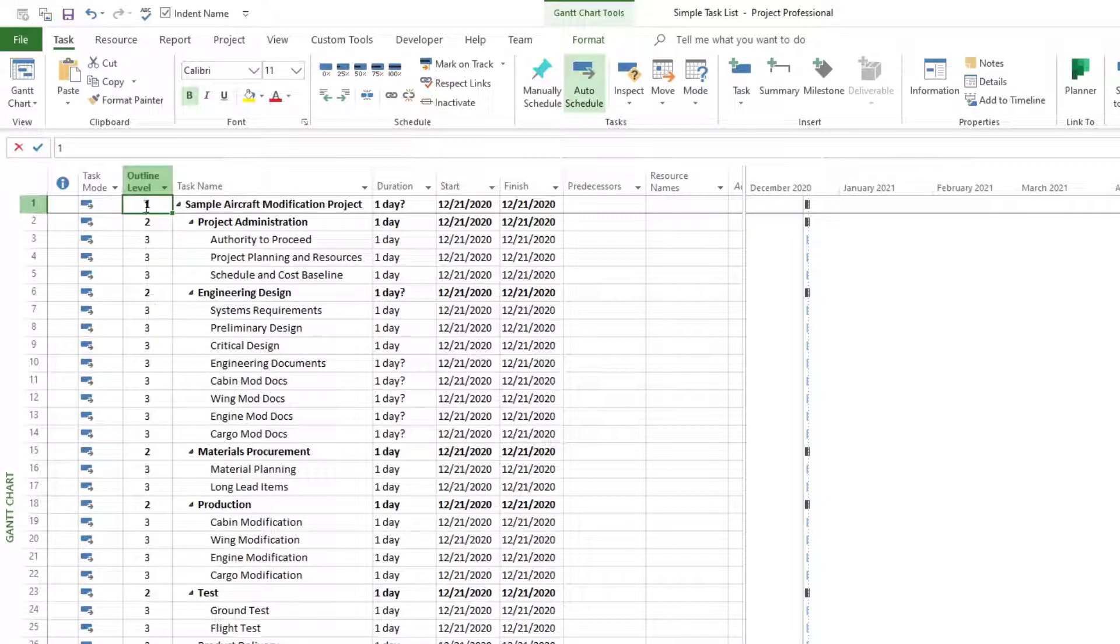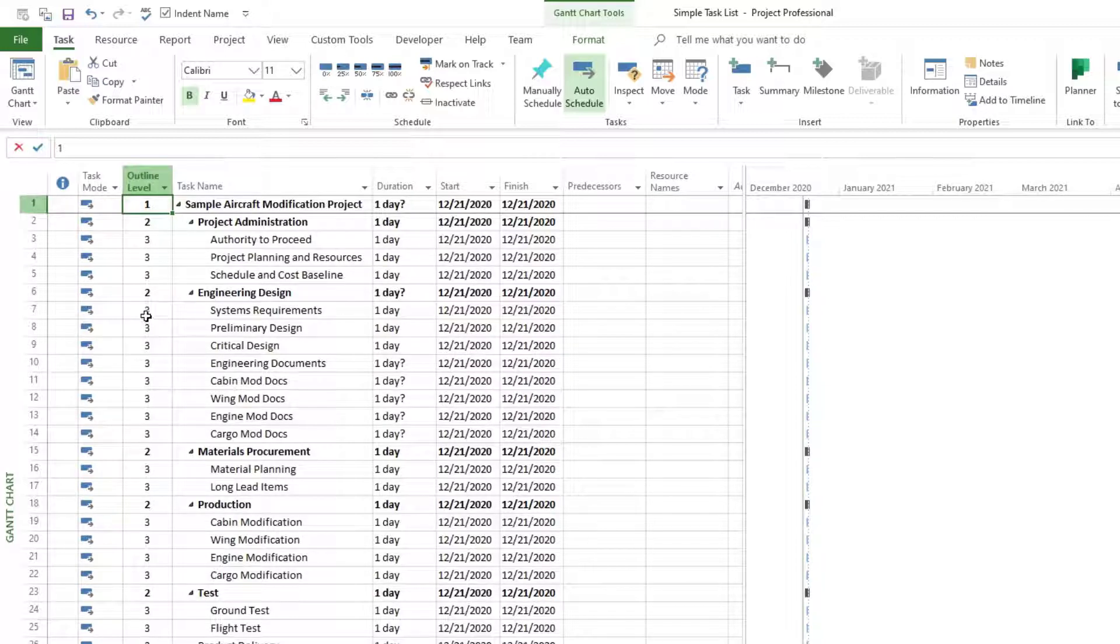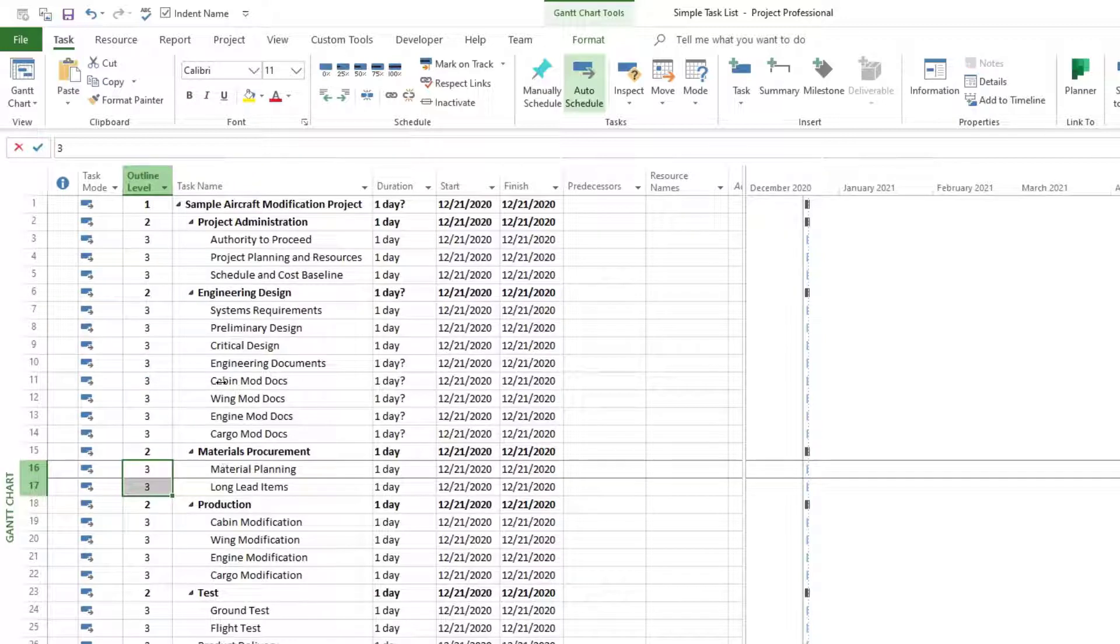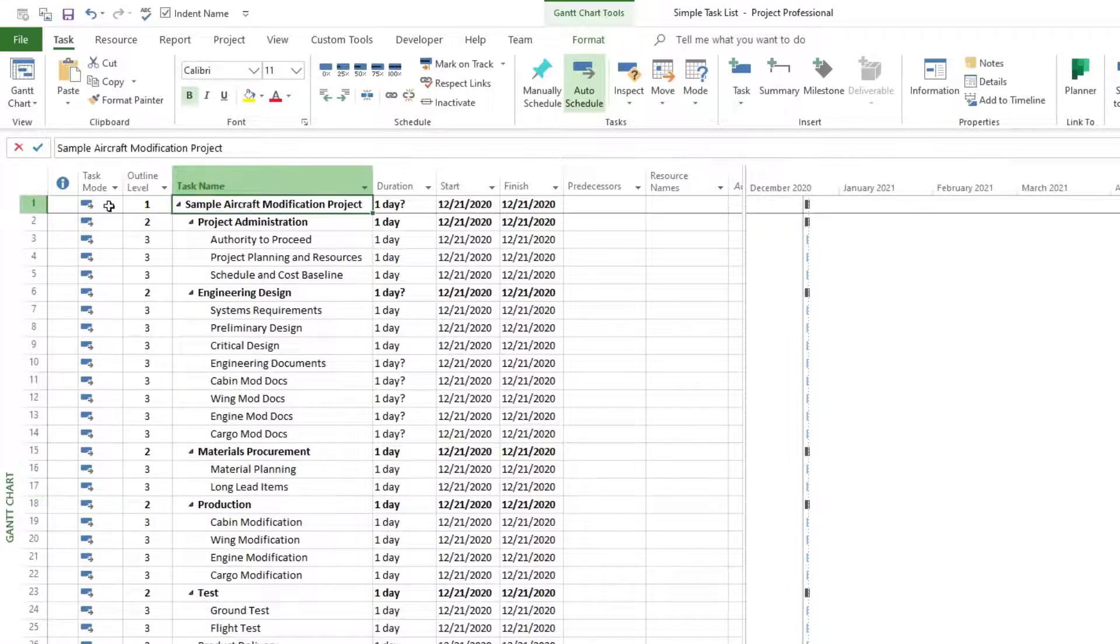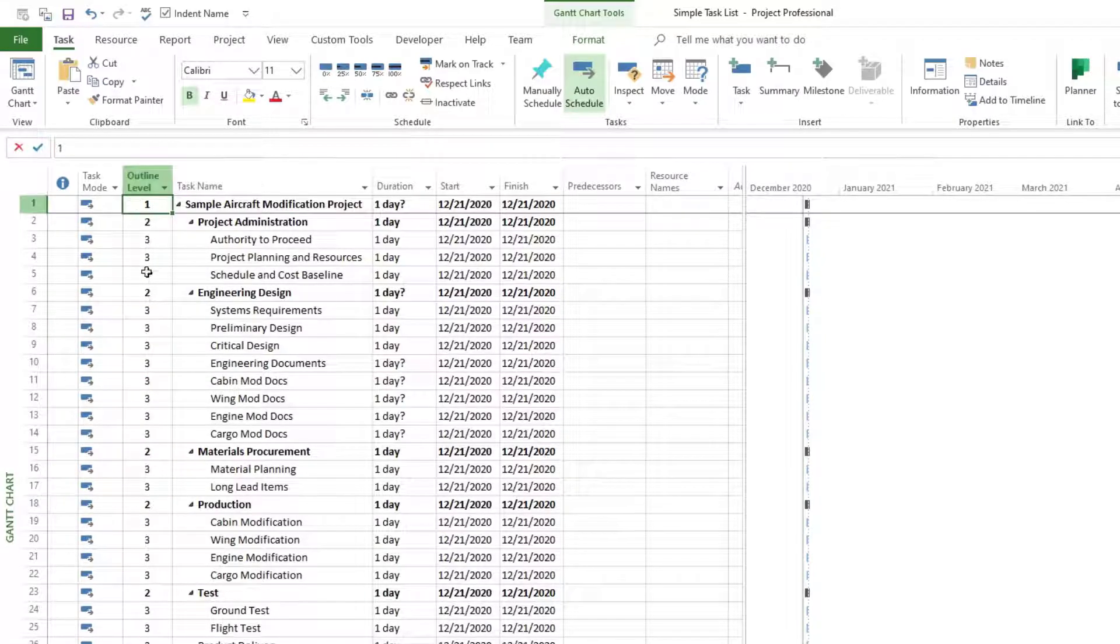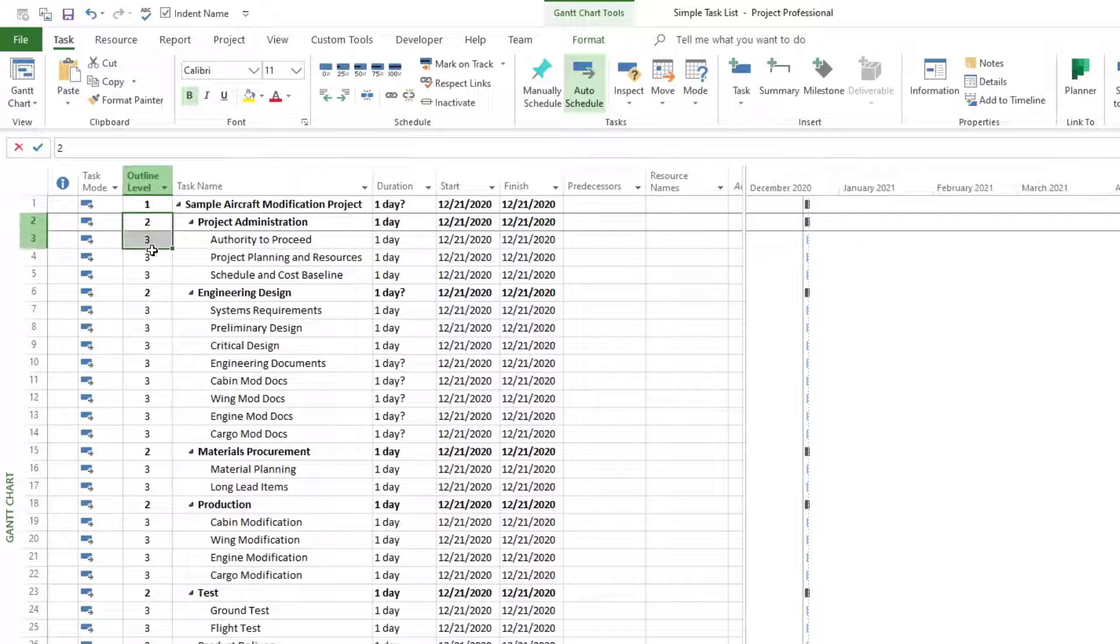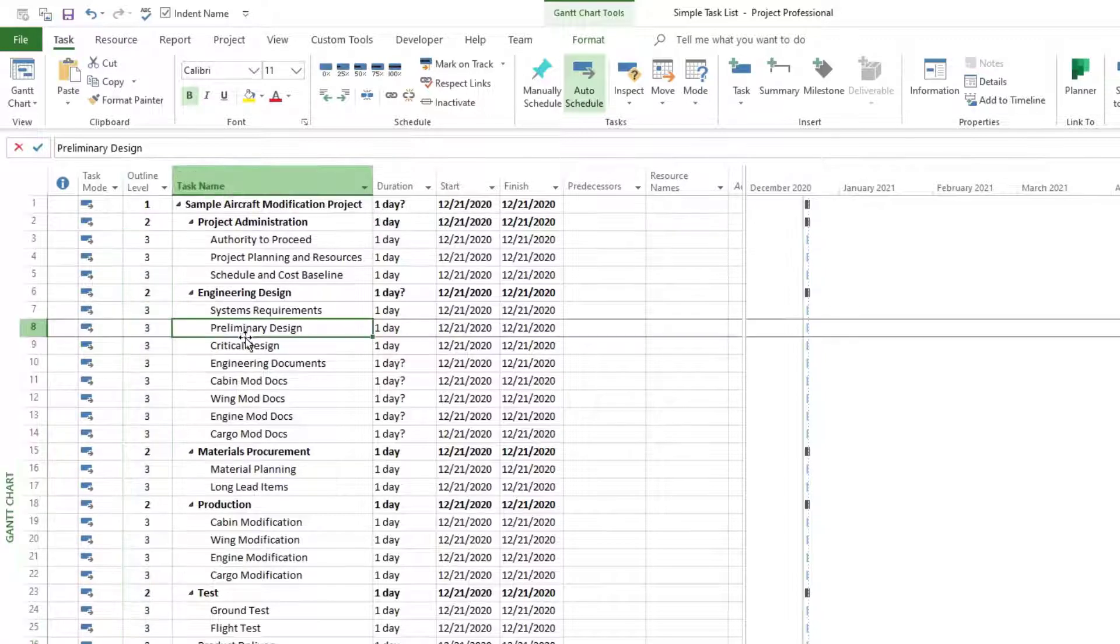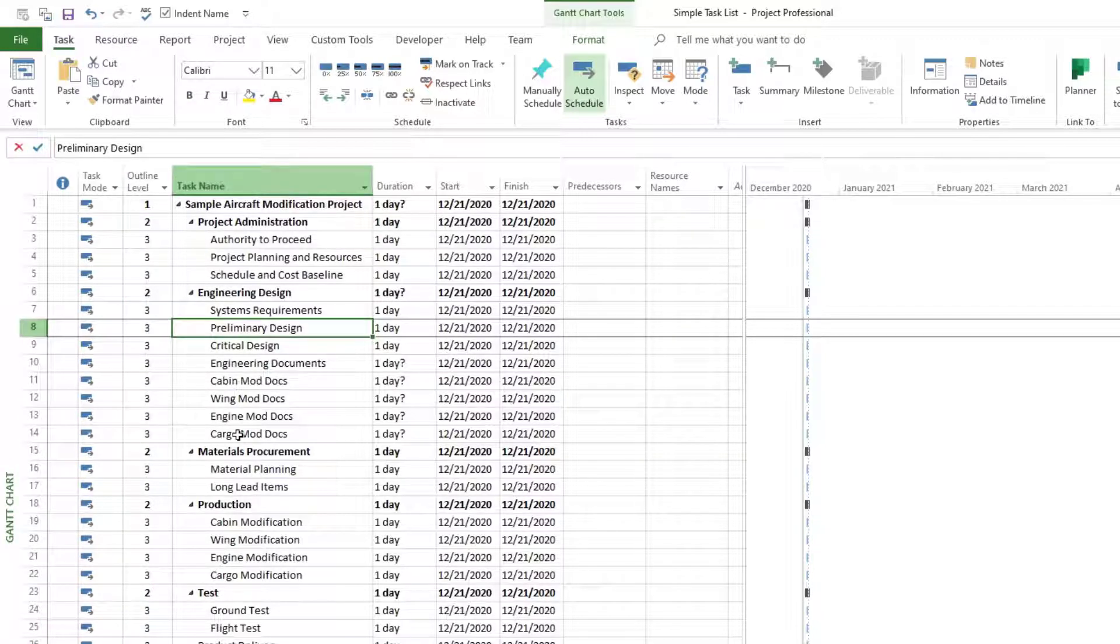Alright, so this gives us our structure of our schedule. Most of our tasks, our subtasks, are at level 3 right here. And then our top task is at level 1, and everything else is below that at a higher level, 2s or 3s. We don't have 4s in this schedule. So that kind of gives you an idea of our structure.